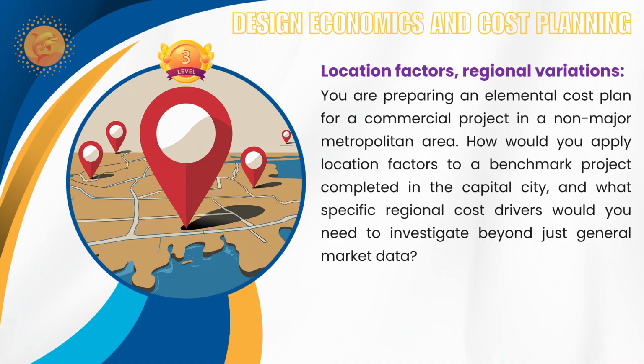And then you have to see the local authority fees, unique planning requirements, and specific site logistics. Something like traffic restrictions, and how the accessibility differs in comparison with your existing benchmark project in your capital city. So it will be helpful when pricing using the benchmark from a different location, considering regional differences.